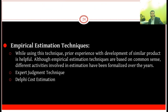The first one is empirical estimation techniques. By using these techniques, prior experience with the development of similar products is helpful. Although empirical estimation techniques are based on common sense, different activities involved in estimation have been formalized over the years. Empirically derived formulas are used to predict the data required as part of the software project planning step. The two techniques used in empirical estimation are expert judgment techniques and Delphi cost estimation.